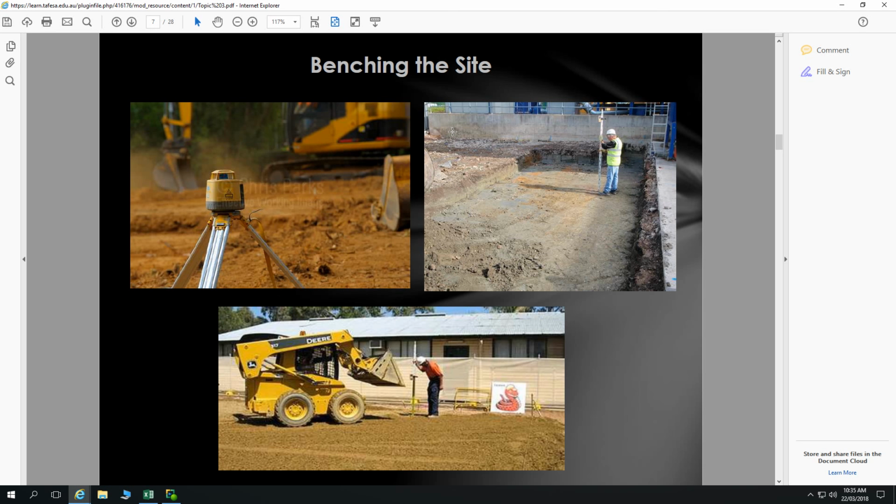That's going to be an issue for us with bringing in rubble, with bringing in concrete trucks, etc. And so we need to plan for that, and we need to get our processes in place at that site preparation stage. So think about, okay, we're preparing for the building footprint, but we'll also have to be preparing for getting machinery onto site, etc. in other areas.